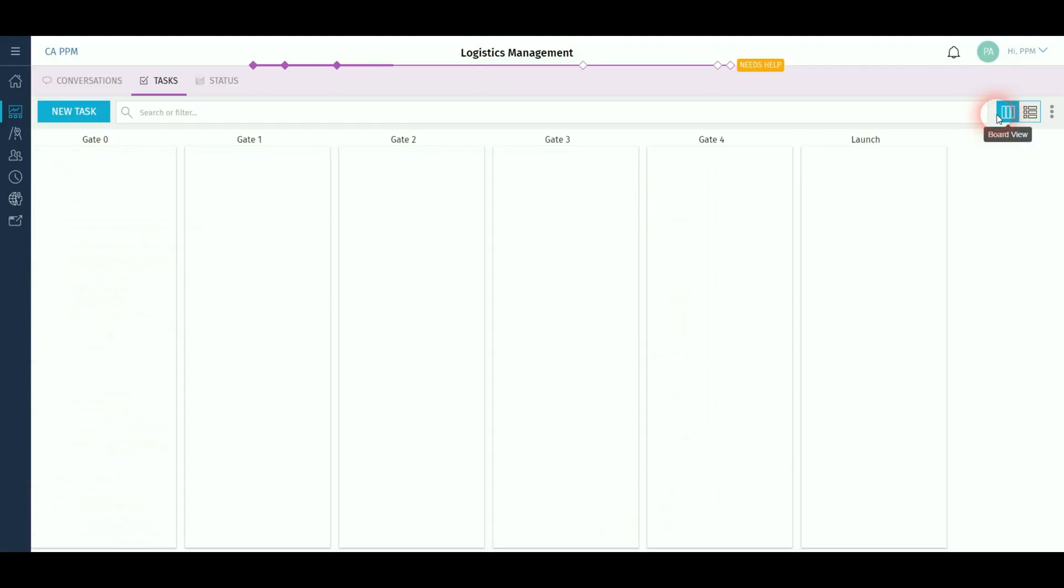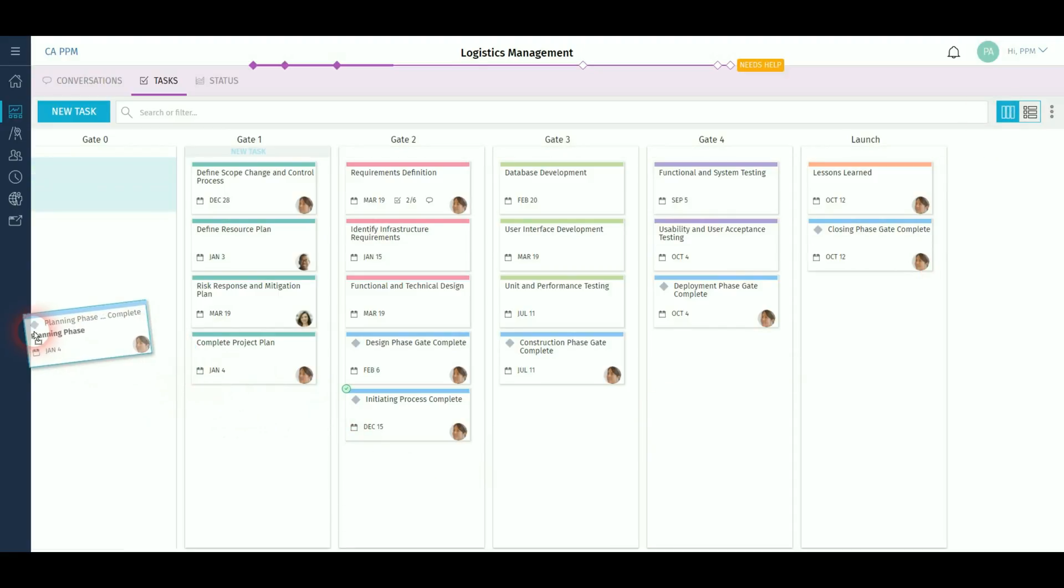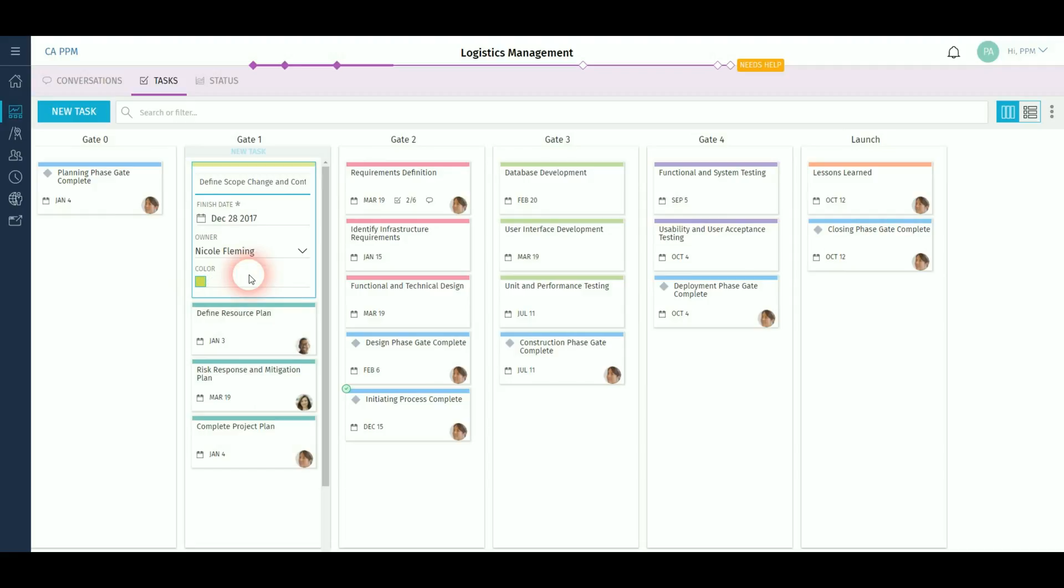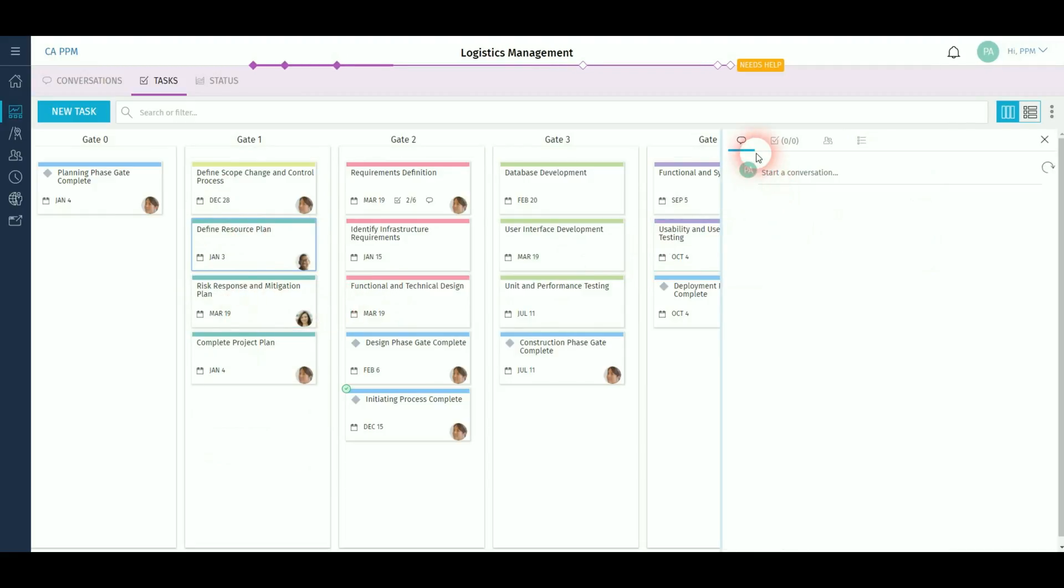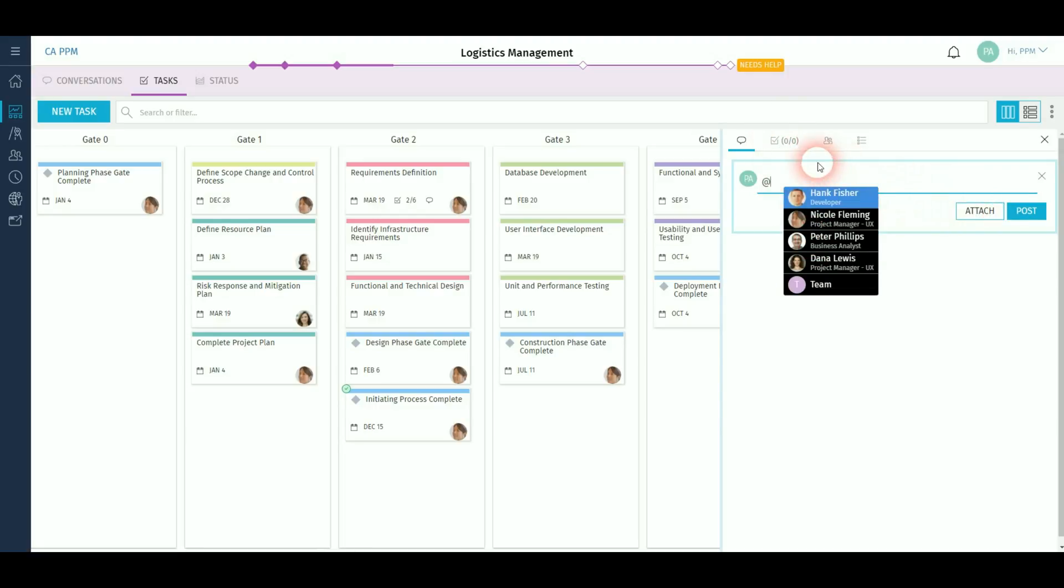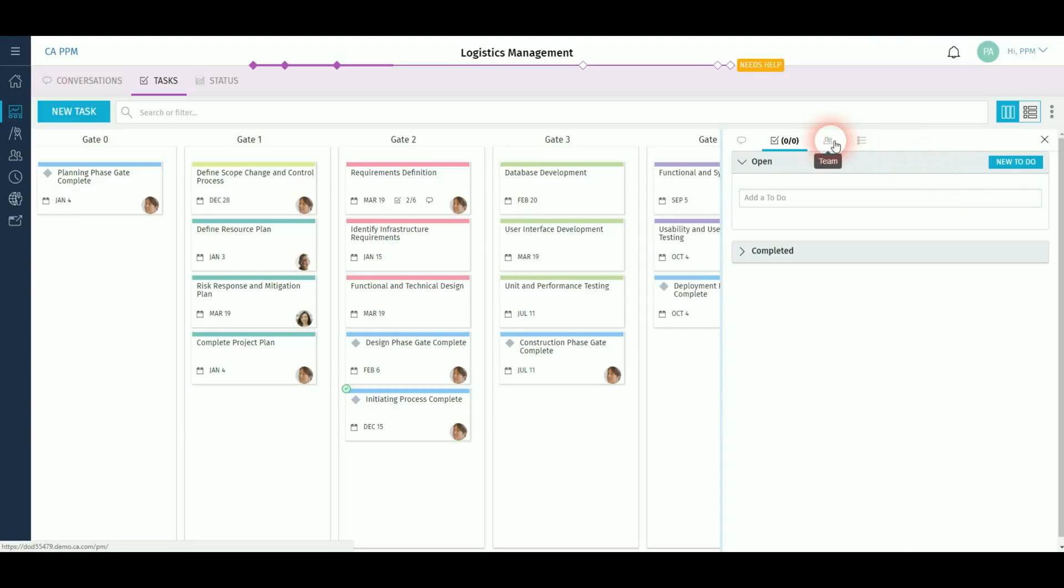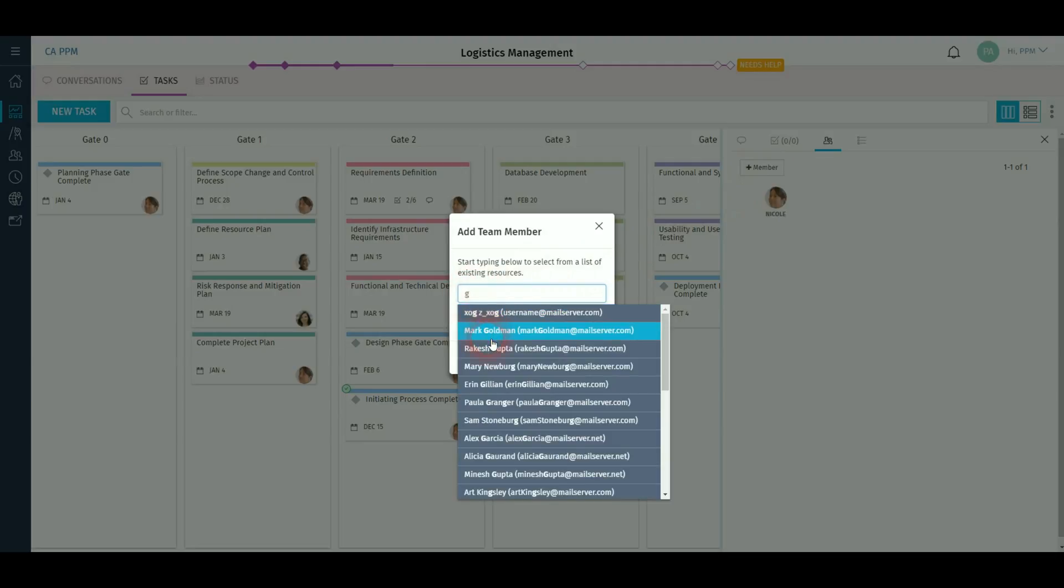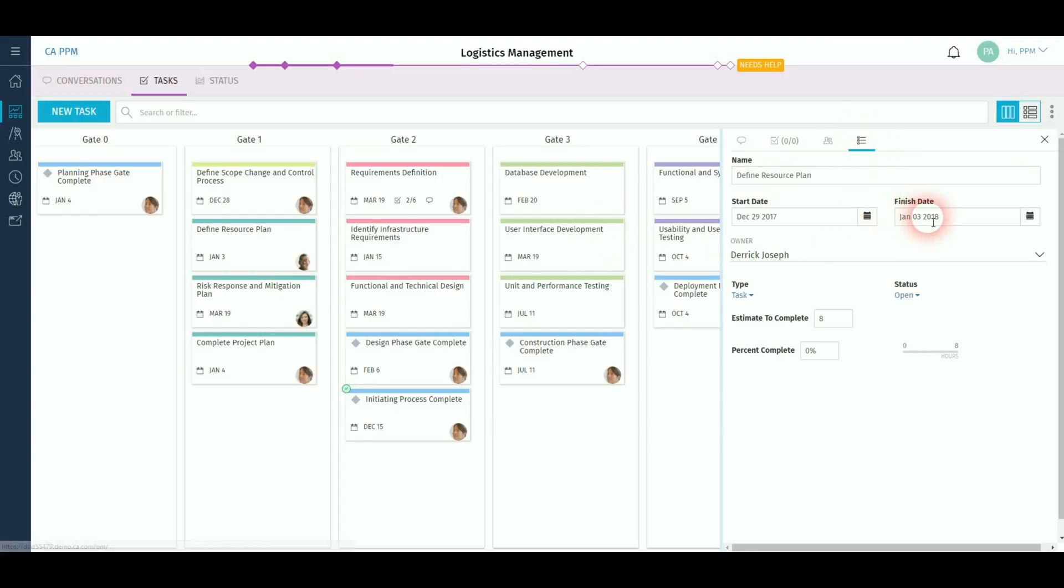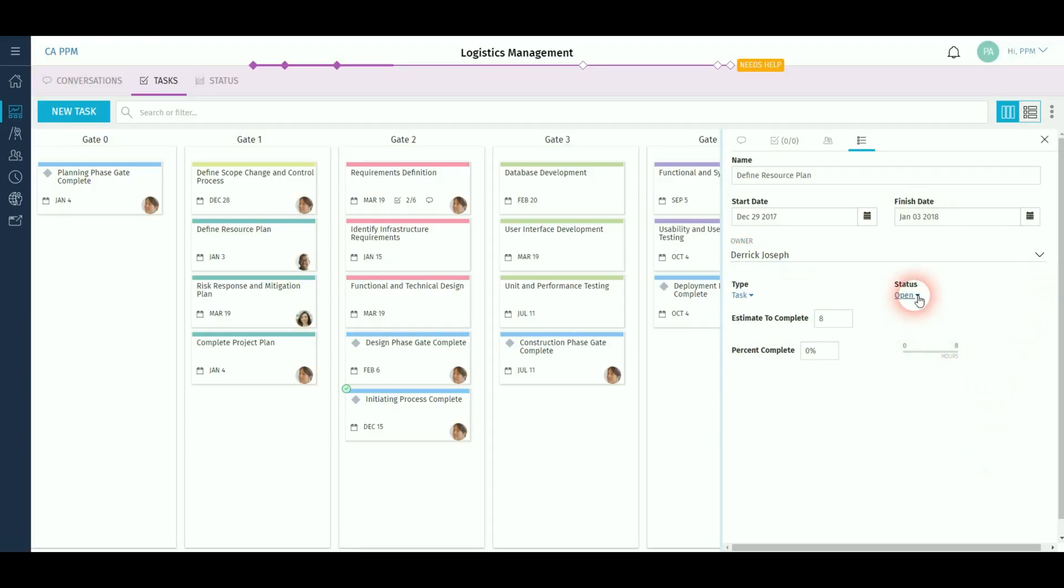The task board view allows teams to work in a Kanban fashion. Simply drag and drop between custom defined columns. Edit properties such as color, owner directly. Create conversations on the task using at mentions and attachments if required. Create granular to-do's against the task. Add more people to work on the task from the team. Change specific elements of the task such as date, status, owner and you can also use Gantt view or scheduler such as MS Project or Open Workbench.